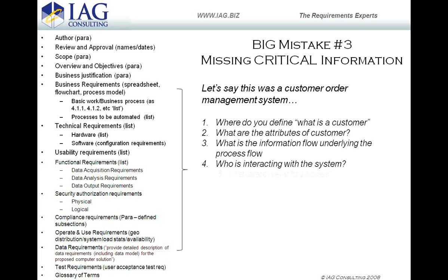We're just not sure. What variations exist for the process? If you're going to do your process like what they're saying here, it's actually going to be very, very difficult for you. Because so often when you're doing a base flow chart, or spreadsheet, right? It will tend to overlook the variations, the conditions, the business rules that drive a much more complex business process. People will tend to describe the main flow, but they'll tend not to be very good at gathering the variations and conditions that exist.